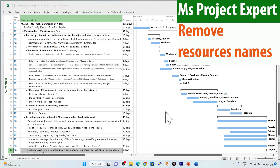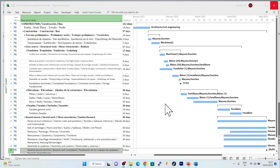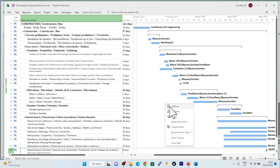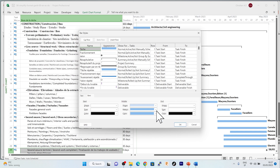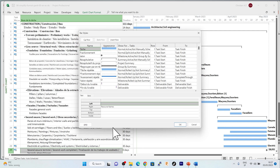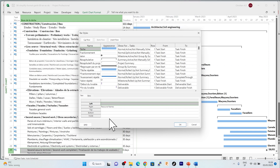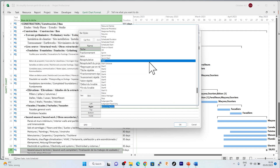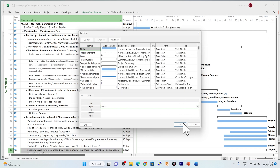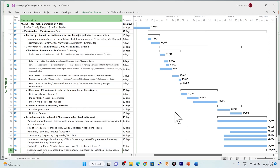Then I delete the name of the resources. In the Gantt chart diagram, I right-click and you can see that we can select the Bar Style. In the lower part, I see that I can change the style of the bar and of the text. Depending on the position around the bar, we can choose the information to be displayed. For the moment, it is the name of the resources — I will replace it with the finish date. You can immediately see that each bar is now completed by the end date.